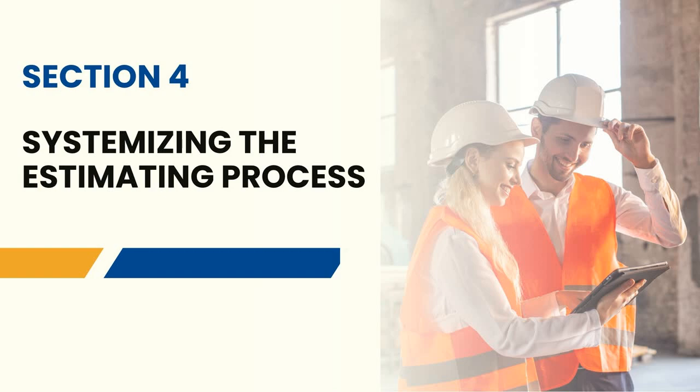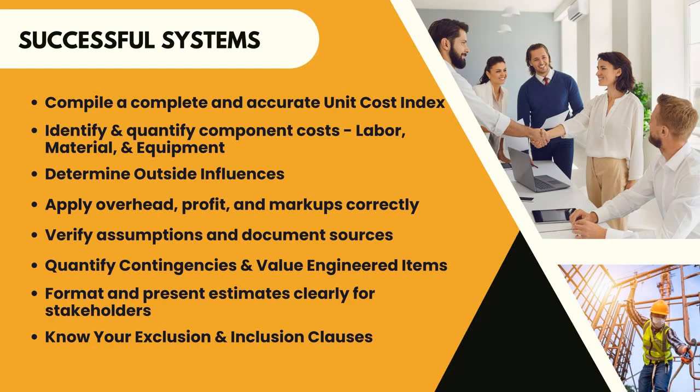So, systemizing the estimating process. Anytime that we are doing estimating, we want to be able to continue repeating the steps that have been successful for us in the past. So, by systemizing, we're able to compile a complete and accurate unit cost index. We're going to identify and quantify component costs for our labor, material, and equipment. Then we're going to determine outside influences. So that's when you may want to lean on the experiences of your mentors.